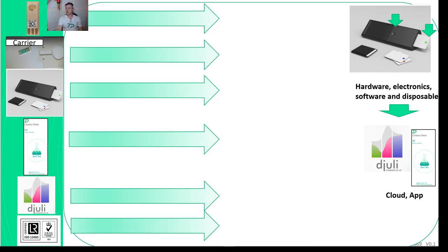So our strategy and theory at ZP is we like to really do parallel development versus sequential development. Sequential development, you do it because you don't necessarily think you know the outcomes of each phase, whereas unfortunately we carry the confidence that means we do know the outcomes of each phase. What we're doing within our development is not development from scratch, but we're really just repositioning technology we already have. So don't start, end, start, end, start, end. That's the sequential way of doing things. Actually, start most things in parallel.